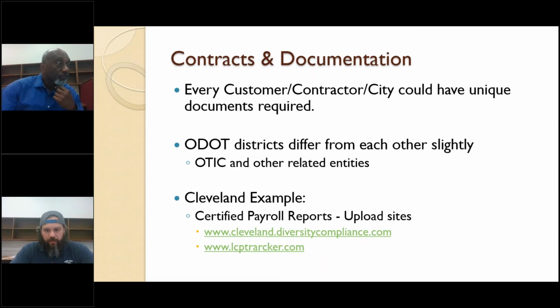For the city of Cleveland, we had a project a year or so back where we had to upload our certified payroll reports to a couple of different online portals to make sure we were in compliance. Again, it's a matter of having open communication with your clients, and making sure that you actually do read the whole book of a contract that some of these entities will issue to you, because there are potentially things like this you have to watch out for, and just an extra line item worth of work that you have to do or have somebody at the office take care of to get all the reports up and running and where they need to be.